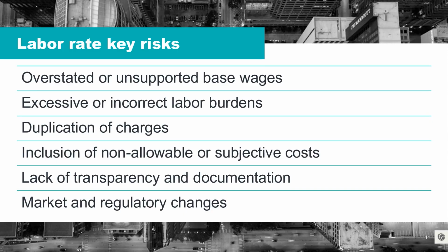Excessive or incorrect labor burdens. Labor rates include burdens such as payroll taxes, workers' compensation insurance, health and welfare benefits, pensions, and these can often be overlooked or not adjusted at all for the actual wage basis.